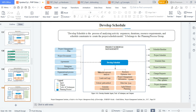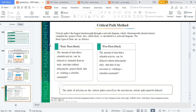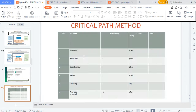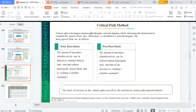Develop schedule: your inputs, tools, and outputs are critical. We'll look at leads and lags and the critical path method later on. The outputs include your project schedule and schedule data — very important because time is money. A critical path is the longest duration path through a network diagram, which shows activities sequenced over time — some tasks overlapping, some finishing before the next starts, depending on the relationship.